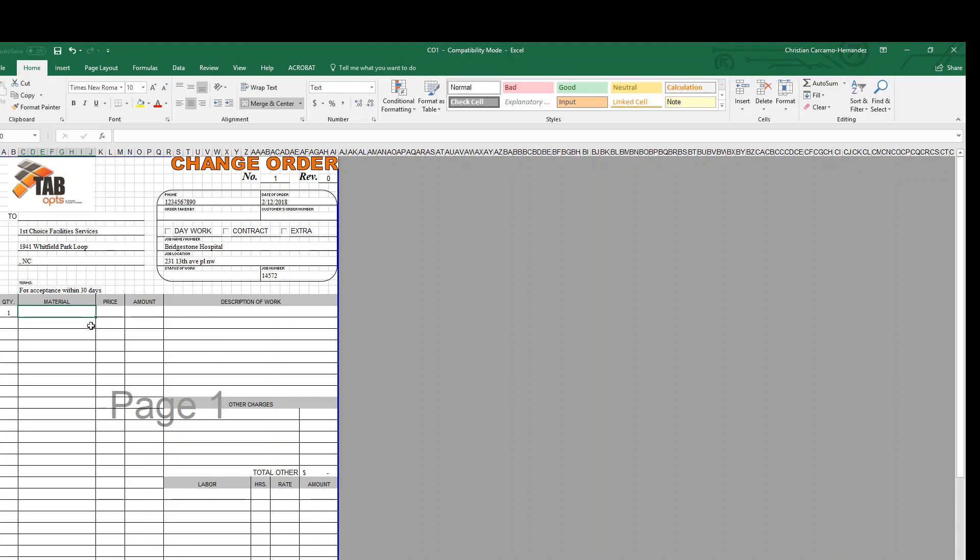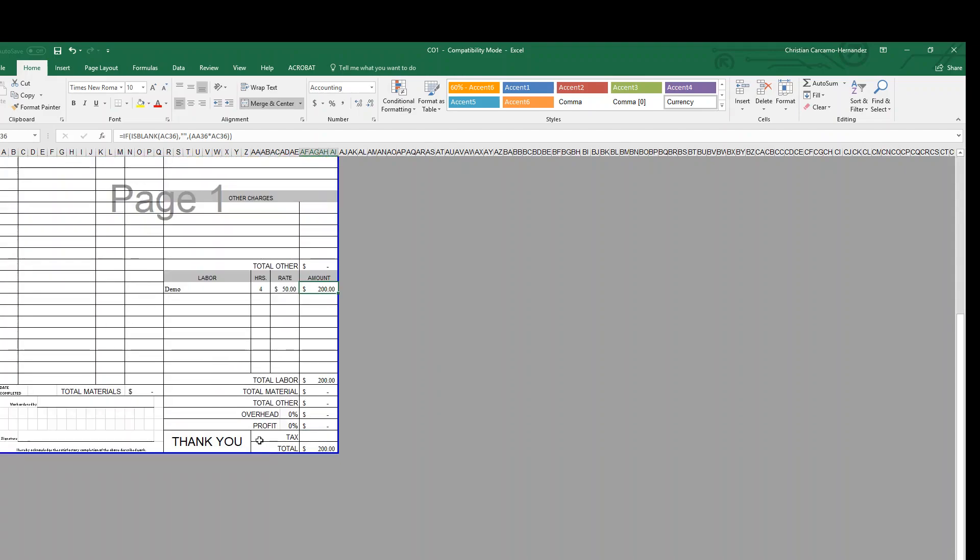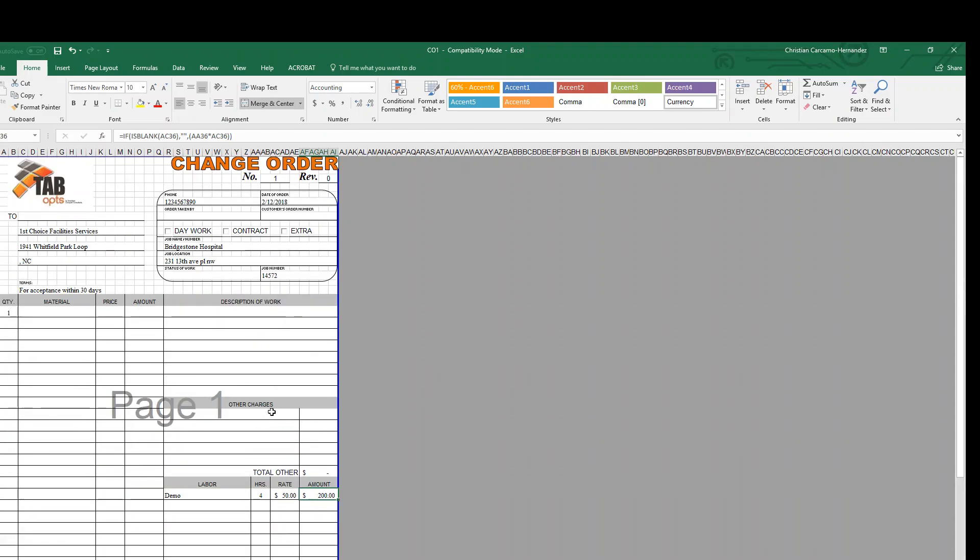Let's just do labor—demo—and that's 4 hours times $50 an hour, which gives you $200 for a $200 change order.